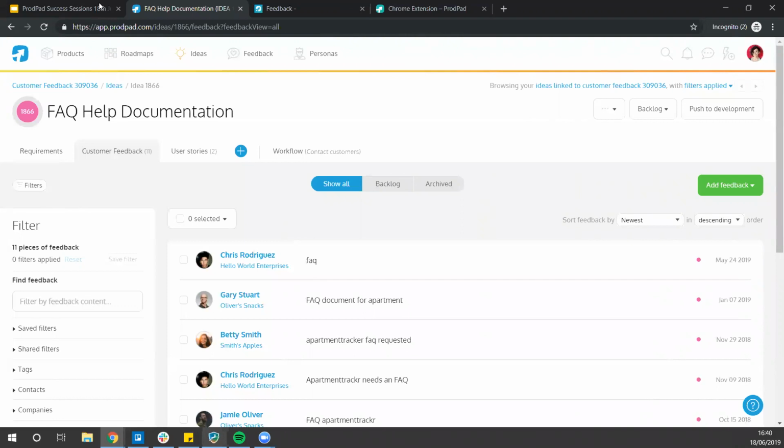If I'm understanding this correctly, what we do is review all of the feedback, and then we write our user stories in gherkin format. If you know what gherkins are, it's just a way of writing user stories. So it would be, as a user or as a type of user, I would like to X in order to Y.